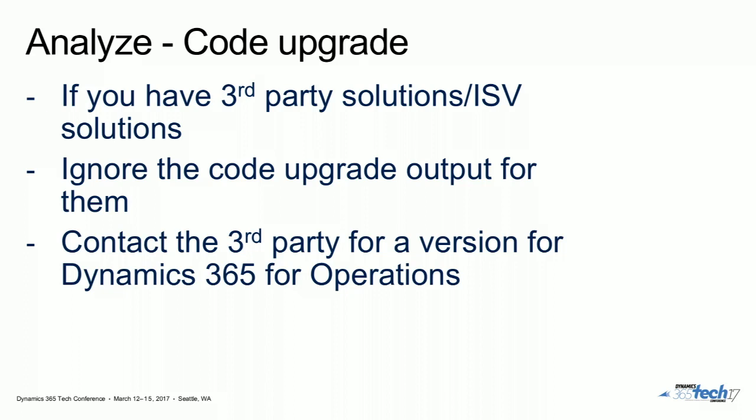So the specific technical reason why it's better not to start working, unless you have very, very separated verticals where you can work on something completely isolated, and even then I would hesitate. The technical reason is, you can't open the application until everything compiles. It's not like AX 2012. It's a small detail in 2012 or the older versions that if there's a compile error somewhere, everything else still runs. In Dynamics 365 for operations, because it's more .NET based, if there's a compile error, there's no DLL. You can't open the application.